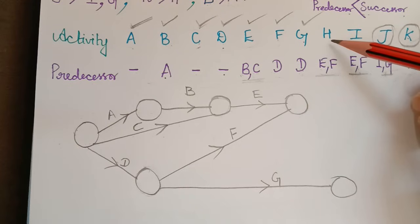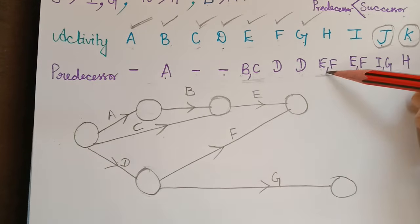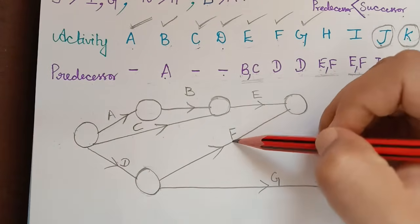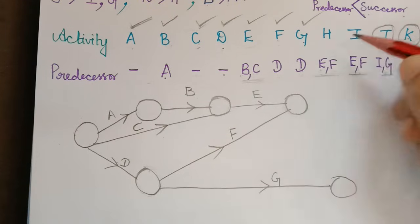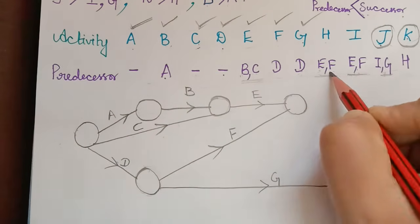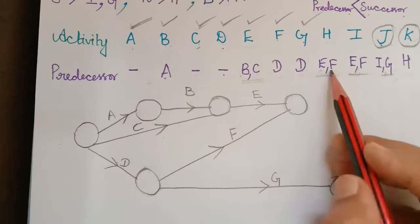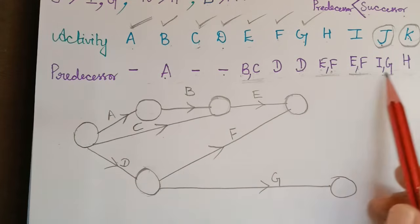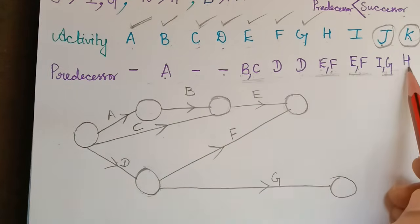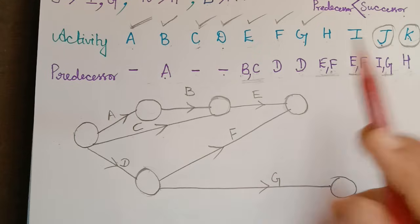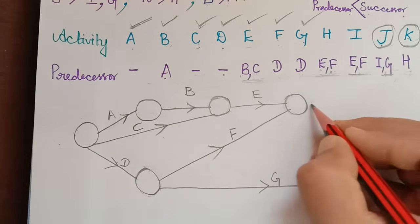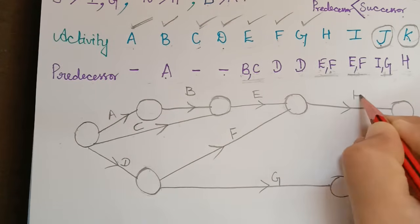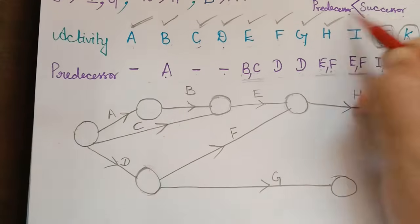Now we draw activity H. Its predecessors are E and F, so the starting node is their shared end node. Checking the predecessor list, H appears only once with no other activity alongside it. So we draw activity H directly from that node to a new end node.